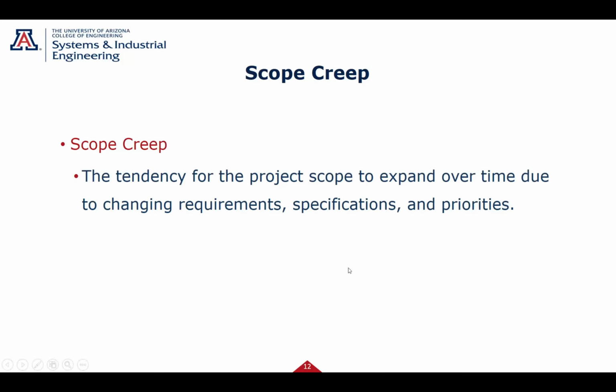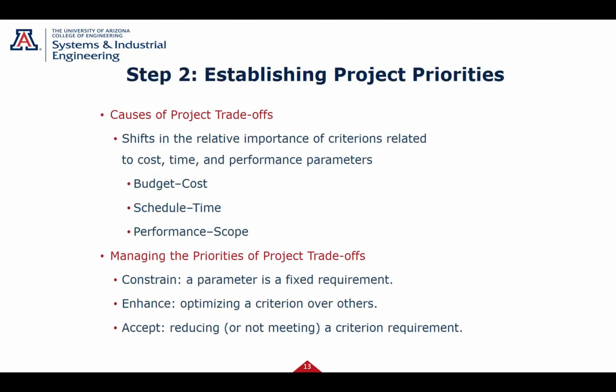Okay, so then they're going to probably come back and say, no problem, here's how much more it's going to cost. As a negotiating point, you may not charge for every scope creep thing, because then you may ask for some trade-offs with the customer. And again, we'll talk some of that later on, but be careful on scope creep.